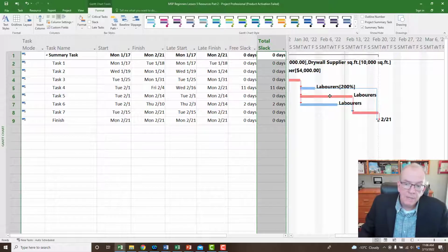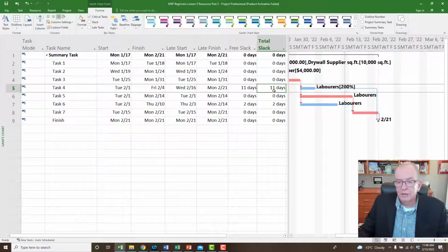And see, look, I made a mistake. I was just counting to this. I actually have even more float. Sometimes if you're not paying attention to where the link goes, you might make a mistake. That's why it's useful to actually look at the float. This has even more float than I thought, right? So this could take longer and it wouldn't be a very big deal for us at all.